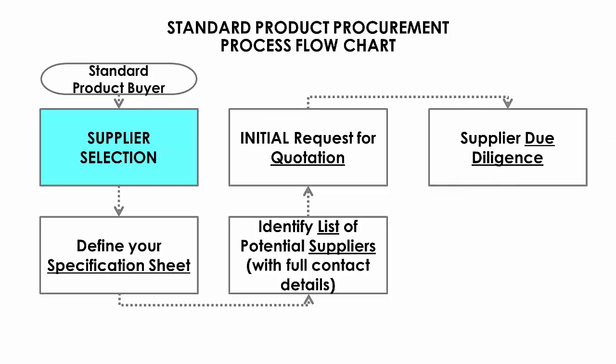It is paramount that you carry out due diligence on your potential suppliers. This should include, but not be limited to, researching the suppliers online and, if possible, paying for an in-depth background research on that supplier. Verify the suppliers can supply any documents that you may need and that they are authorized to actually supply those documents. Determine how quality control is carried out by the supplier and how they might integrate an external quality control audit into the process.